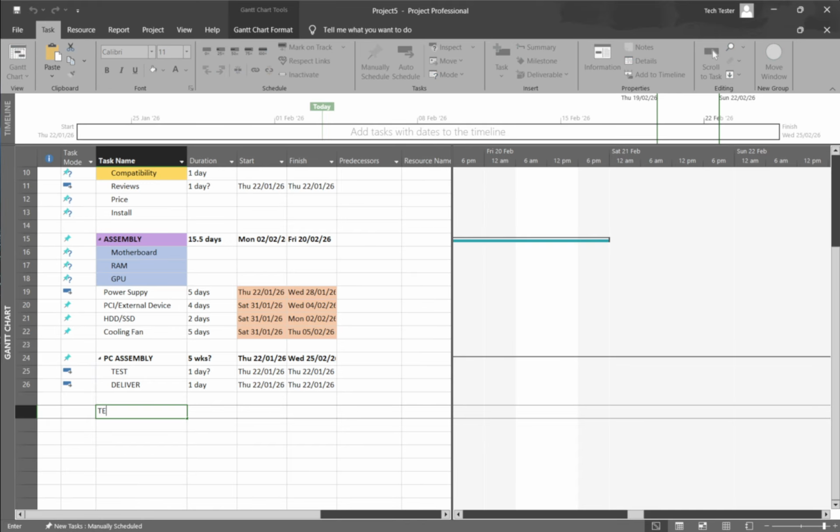Before converting a large set of tasks, it's a good idea to review key links, durations, and calendars so the shift to auto-scheduling produces the results you expect. And that's all you need to confidently switch from manual to auto-scheduled in Microsoft Project.